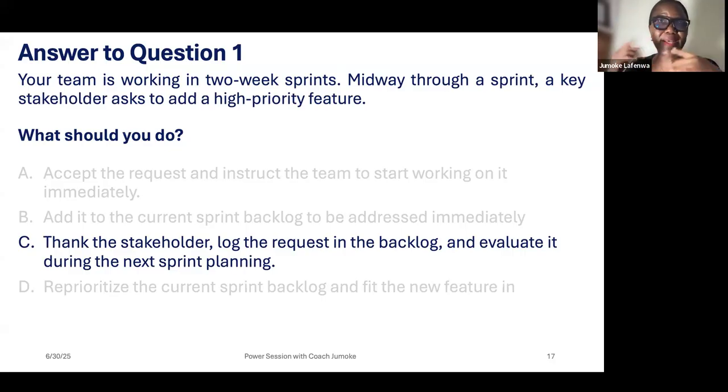As you work, the customer can change his or her mind, and then you keep reprioritizing. So that additional high priority feature will now be included in the product backlog and be reprioritized. I mean, the product backlog reprioritized, and then the project team or the development team will pick this prioritized backlog and pick what they can work on again. So you see, that is the right answer.